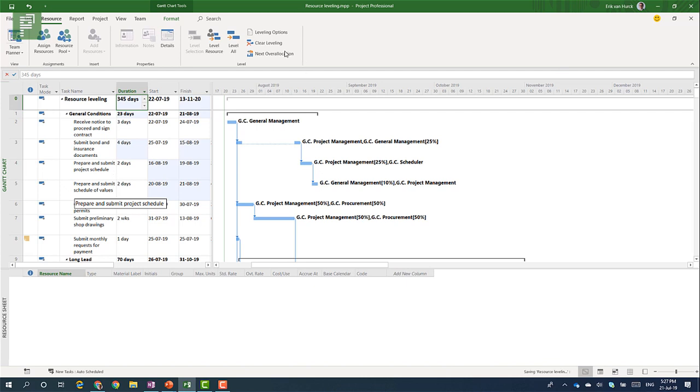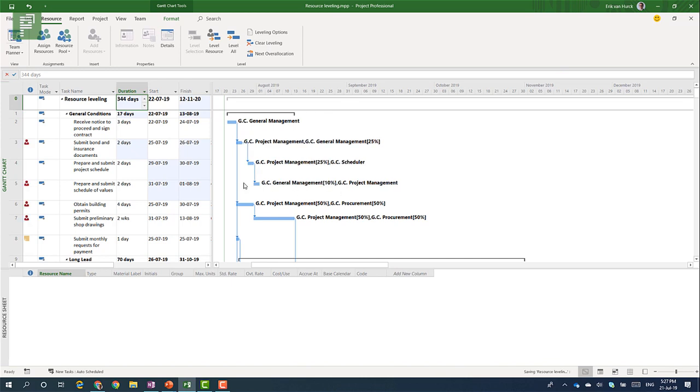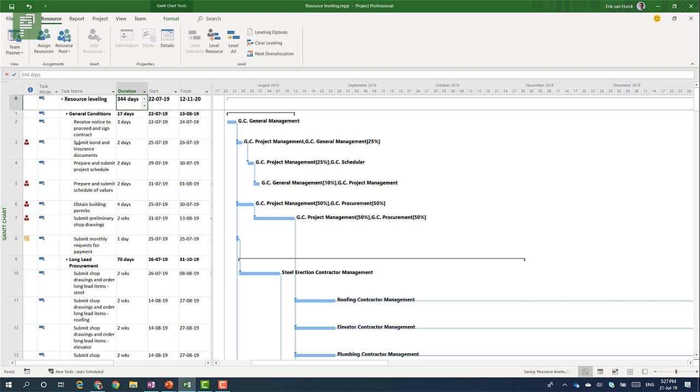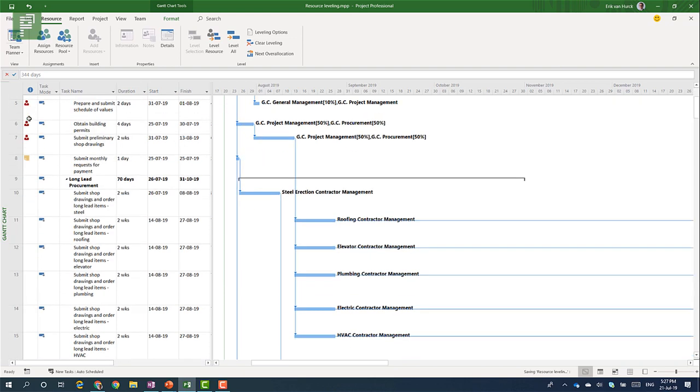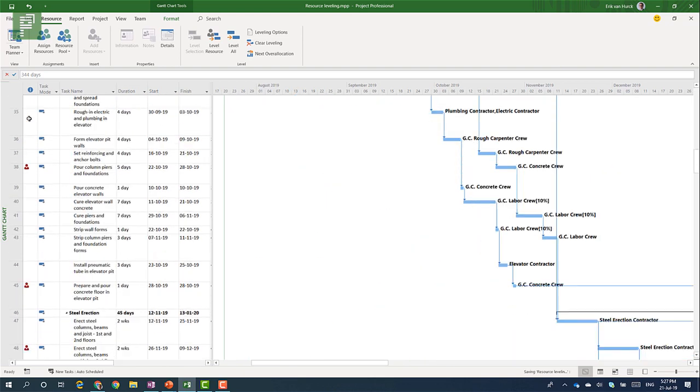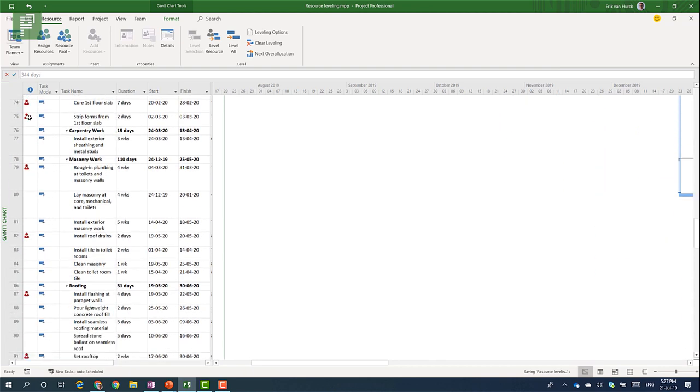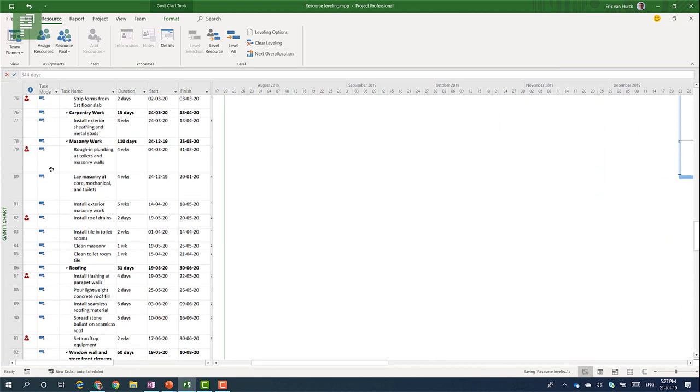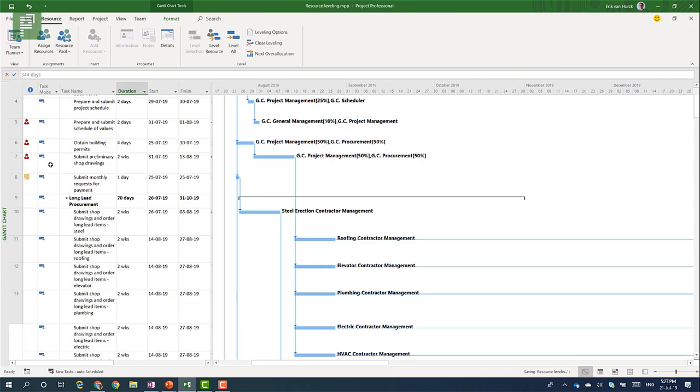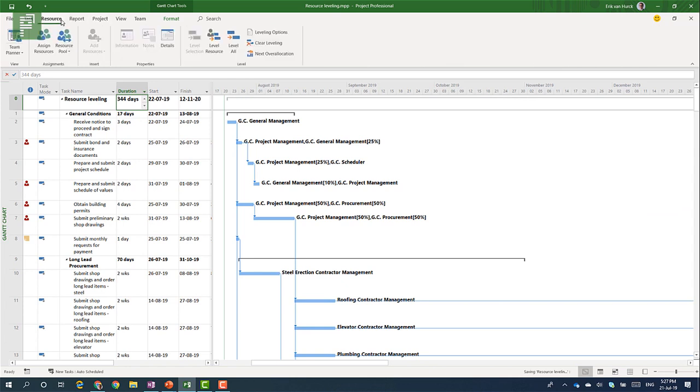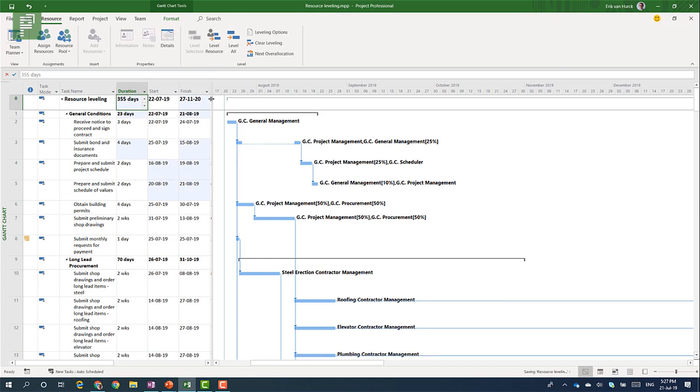So let's clear that leveling again and let's do the full Monty and select the level all option. By leveling all at the end of that calculation I expect there is no red icon anymore in the whole schedule. So let's do that right now. I'll click on resource and I'll click on level all. And after a bit of calculation I see that my schedule now takes me 355 days. Another 10 days extra.